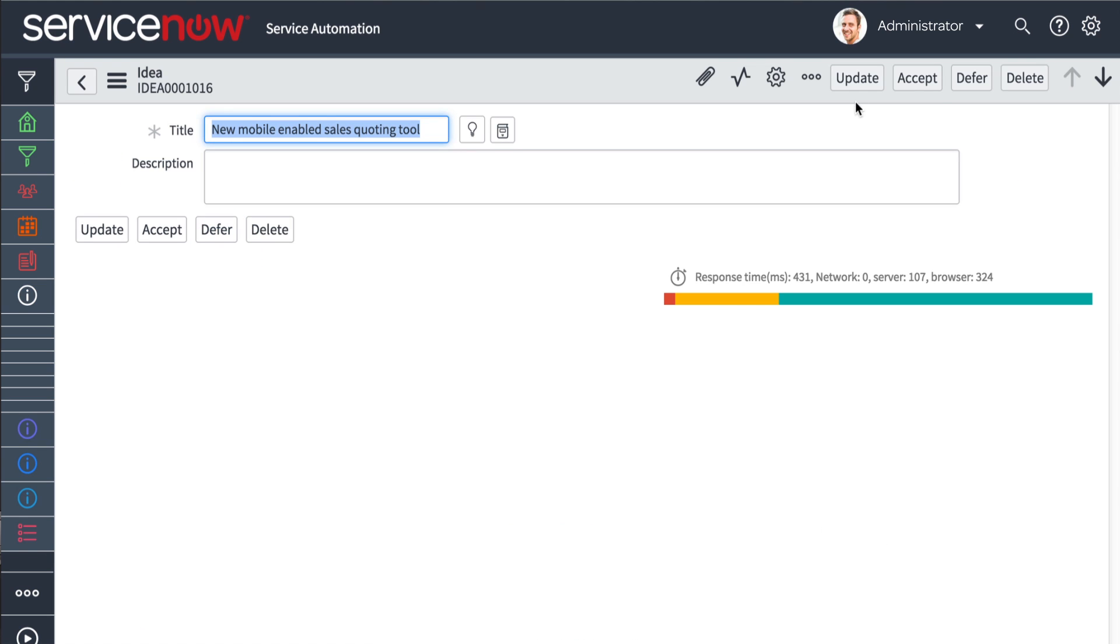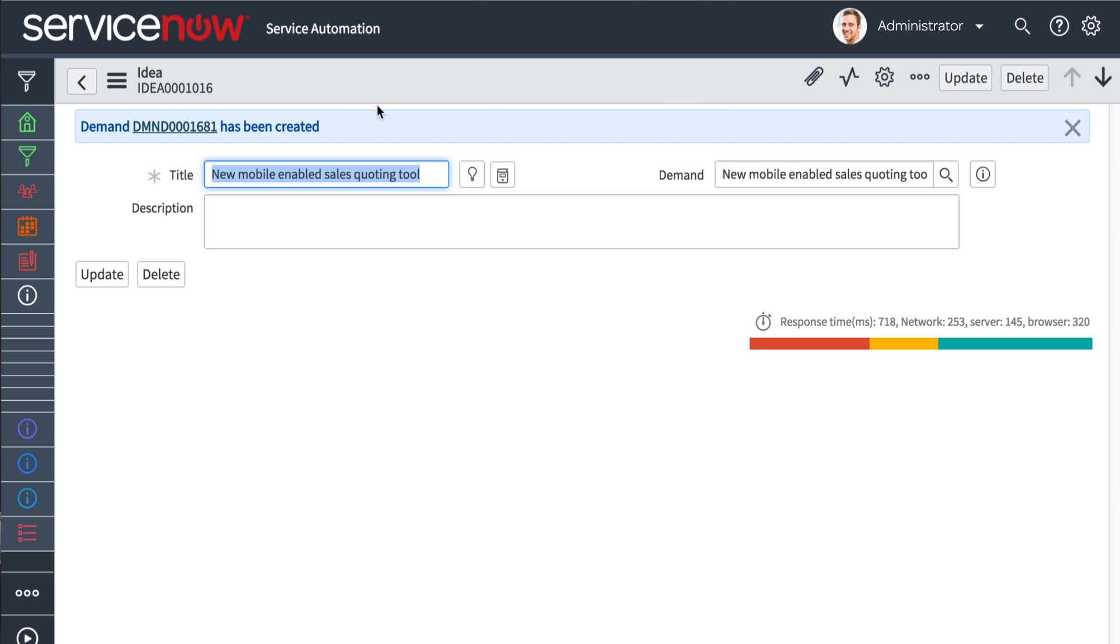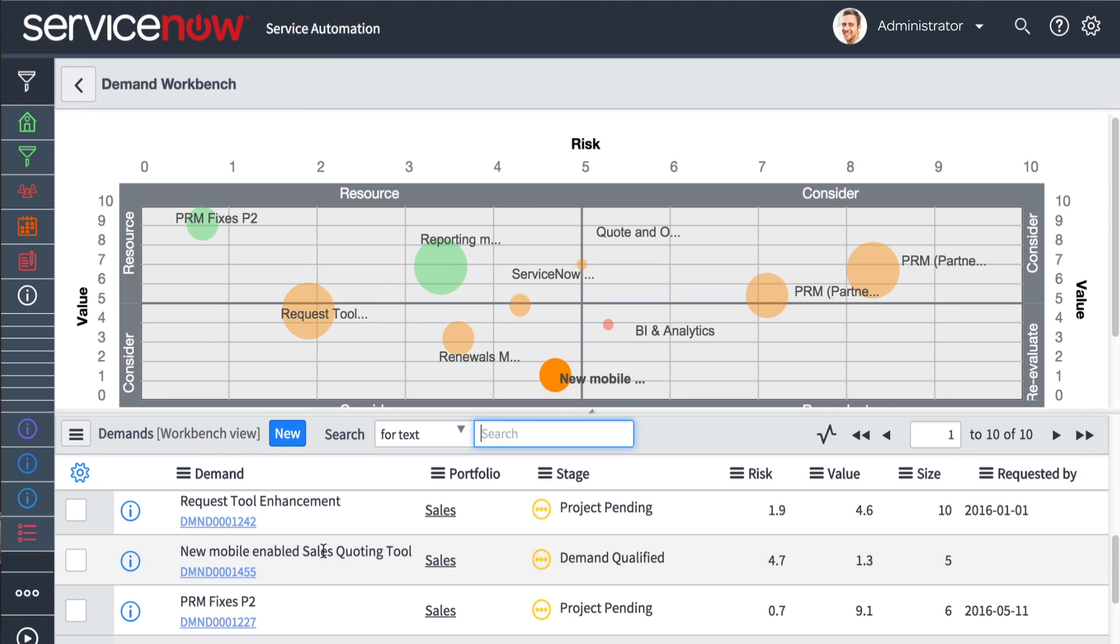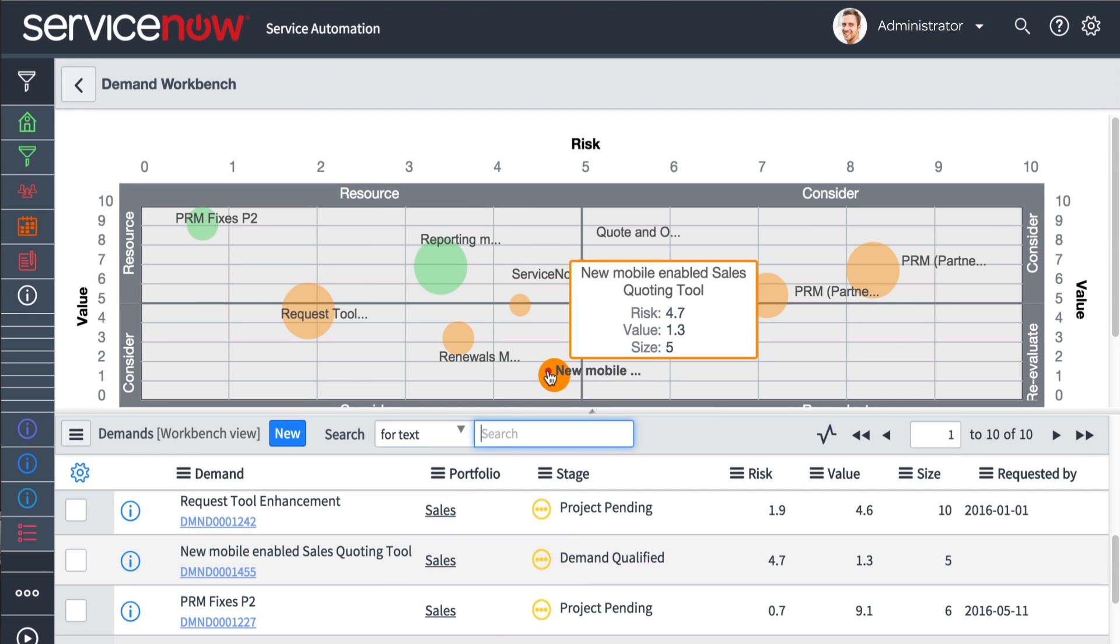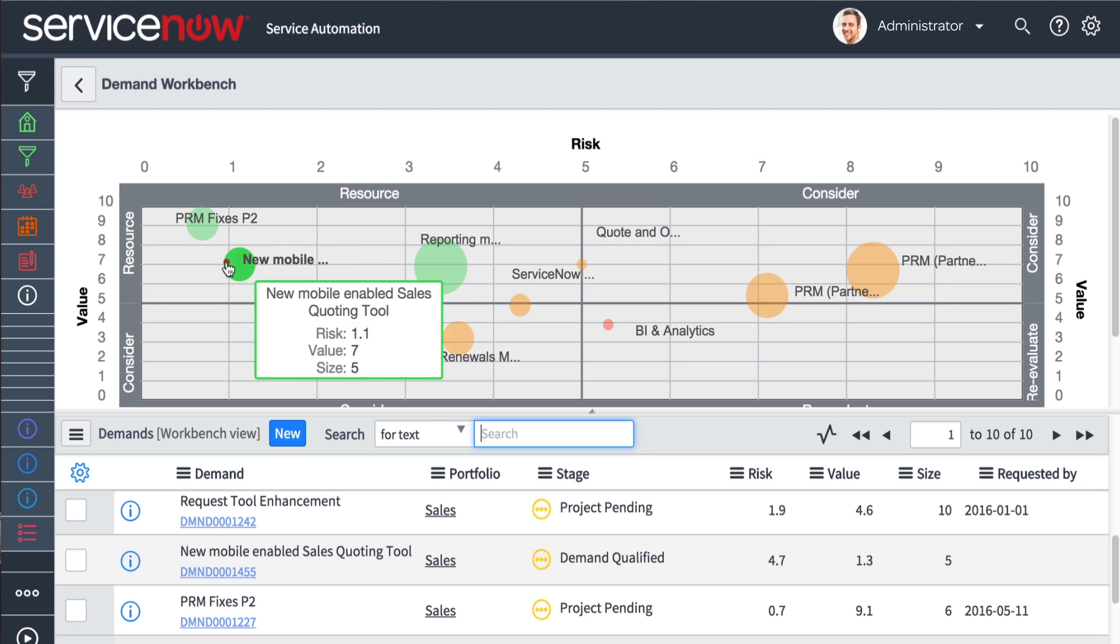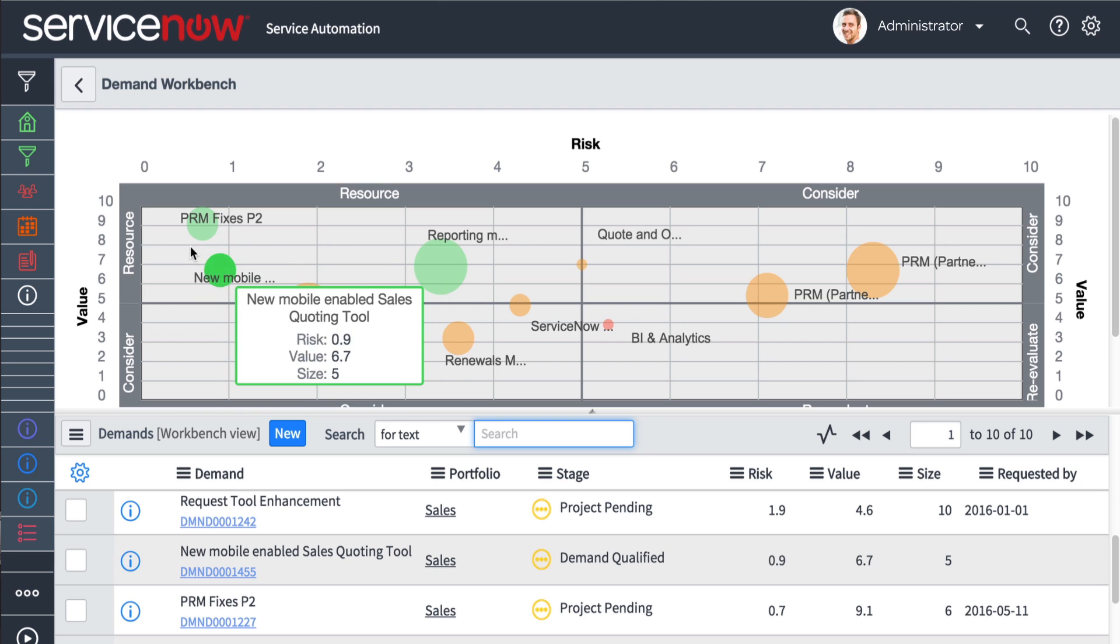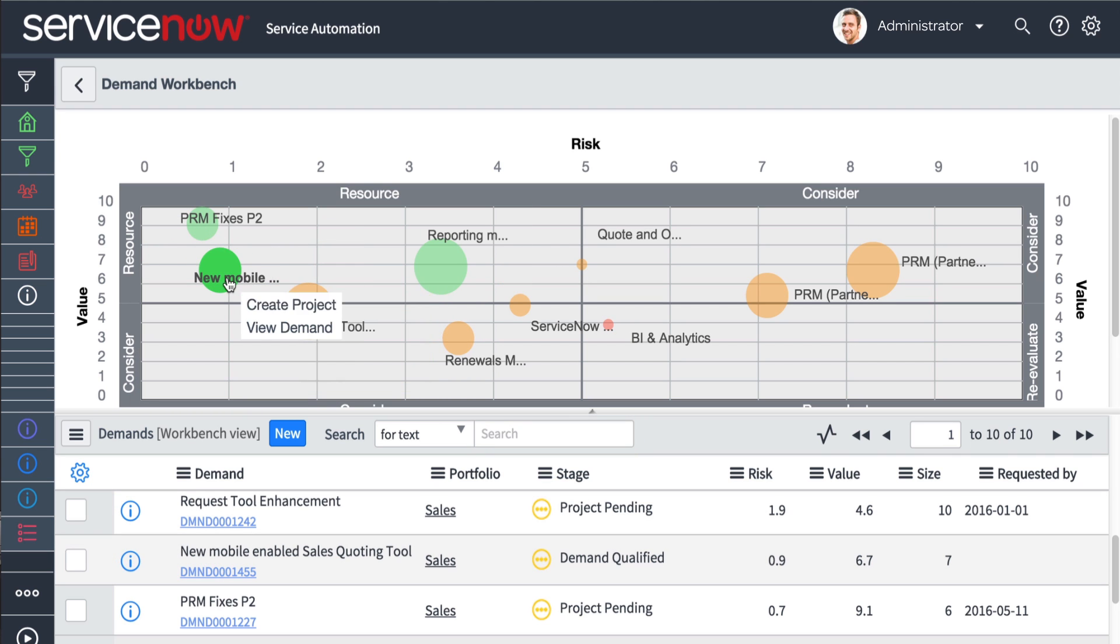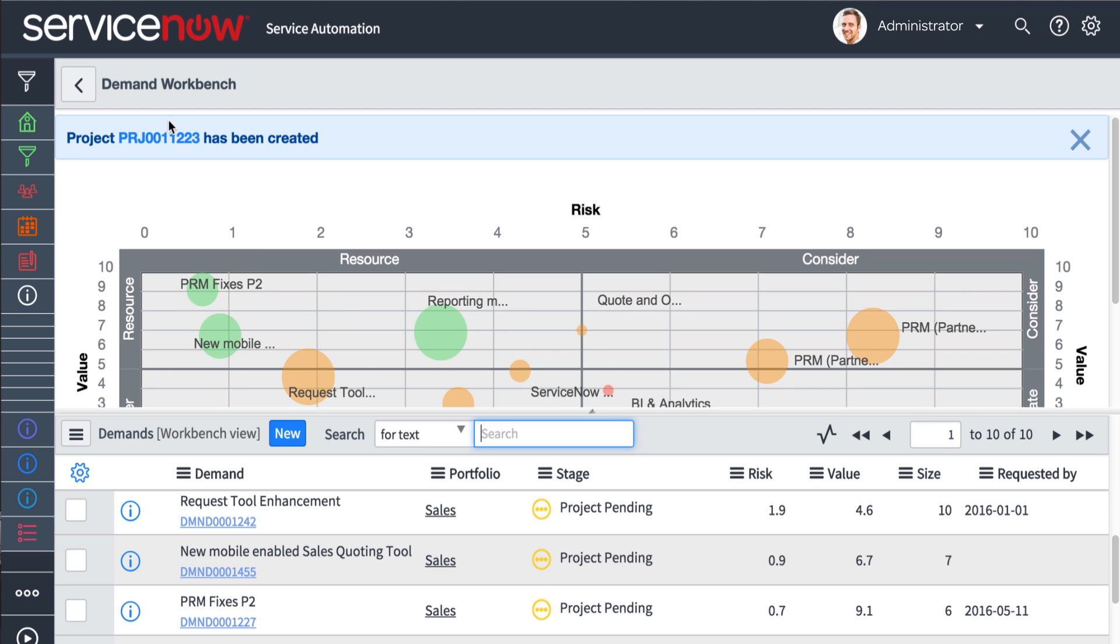These requests are routed to demand managers, who use their enterprise-wide view of resources and other projects to review and assess the business value of each through a centralized demand workbench. After review and justification, the best of these requests are approved and promoted to new projects, enhancements, or changes, as appropriate.